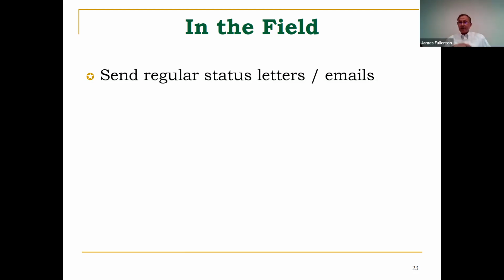We're still awaiting delivery of materials, which is a big thing right now with the pandemic. Supply chain delivery delays is a big part of what we're dealing with. It's important to provide updates on that. It's also very important to anticipate where the delays are going to be and to do everything that you can to make up for the delay or find other sources or whatever it is, and report on that in a weekly status letter.